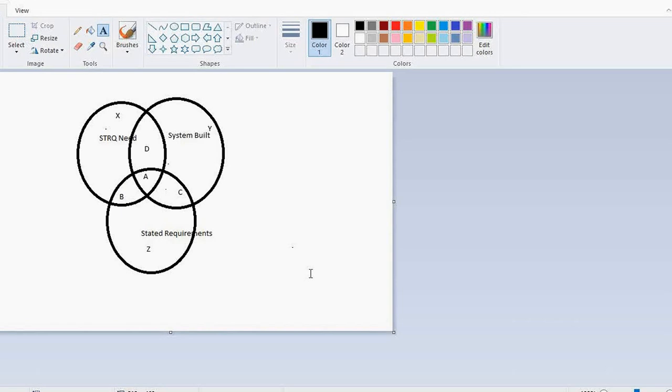You have two choices here. One is one which you kind of mentioned. I want to elaborate on both the aspects a little bit from a practicality standpoint or real world scenario standpoint. One is say, okay, guys, we have closed down the requirements. Do you understand the impact of adding this requirement to the timeline? That's the first question you need to ask. And if they say, yes, we do, but this is a key requirement we can't miss out, the next question is, do you want it as part of the first iteration?